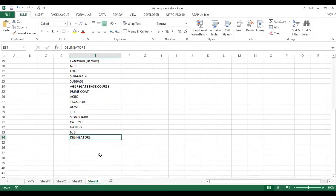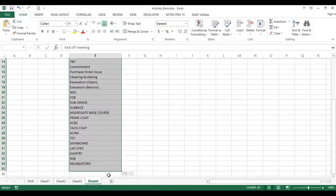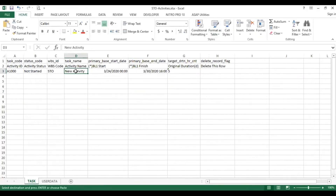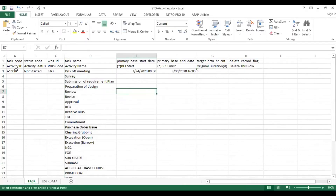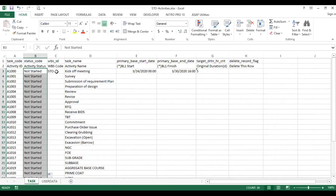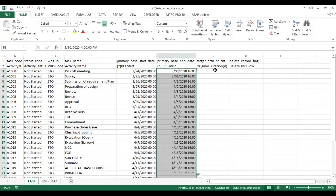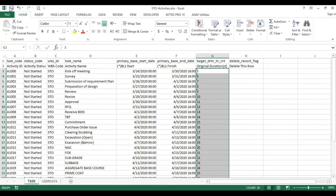Now I'll show you the Excel sheet we manually updated during scope management, which has different activities from the design phase to the procurement phase. These are about 30 activities — you can go up to 30,000 activities as well. I'm going to select all these activities, copy them, and paste them into the Primavera 6 exported Excel sheet. Select the cell, double-click the corner to auto-fill information down to the last activity. Once done, save this Excel sheet and close it.